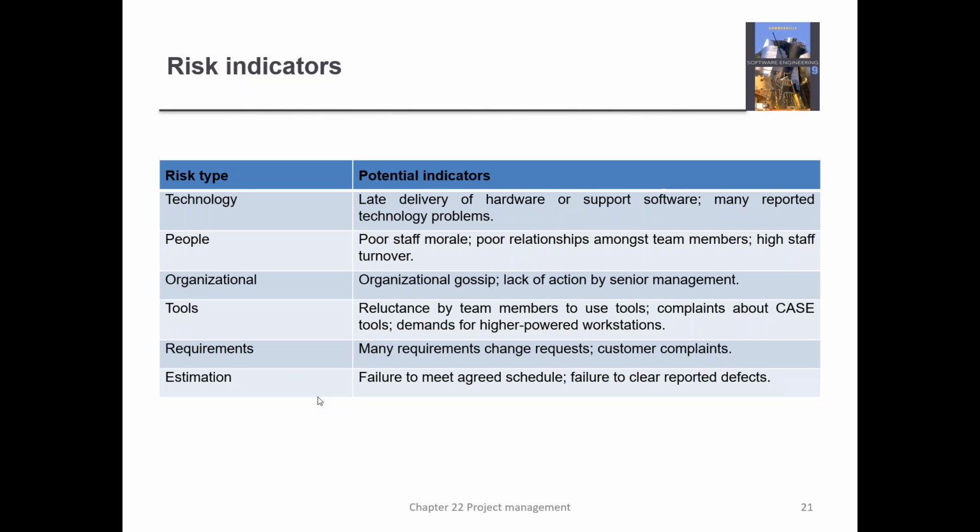Requirements risk. Your customer keeps changing the requirements. Every now and again, and I think I said this to you earlier on, customers tend to not know what they want. So you have to be able to identify who made a particular request for a requirement, who changed it, when, and why. That traceability has to be there.